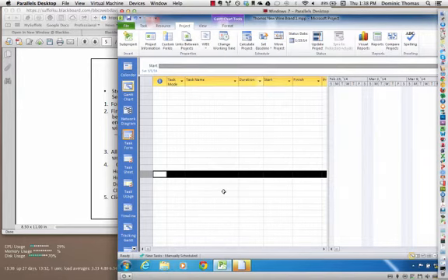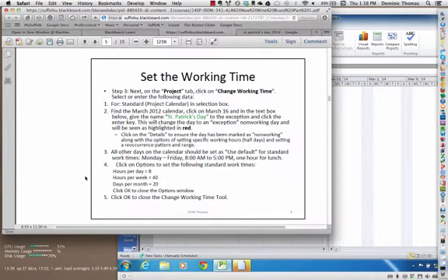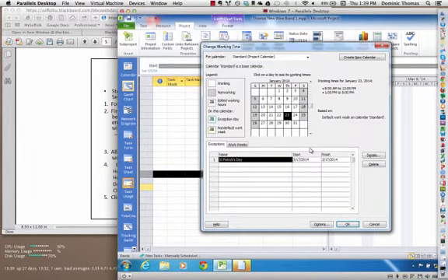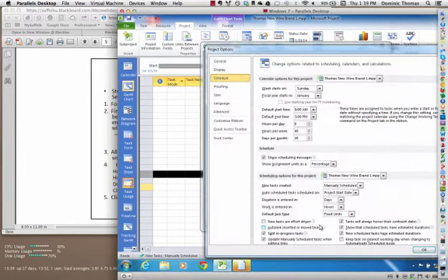So what we've just done is we have indicated that people will not be working on that day. And so Microsoft Project won't schedule any work that day. The reason this is important is that it helps us be more accurate figuring out how quickly this project can get done. We're going to leave everything else as use default, so that should be fine. And our options should be fine. We can check those if we want, so I can come back over here and see our standard work time is exactly as suggested, and the options are set as well.